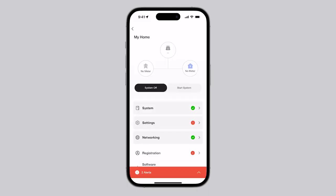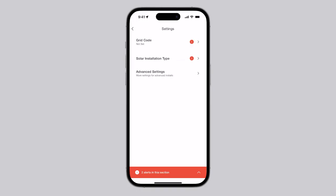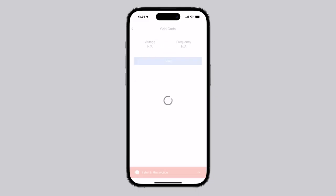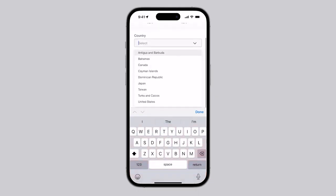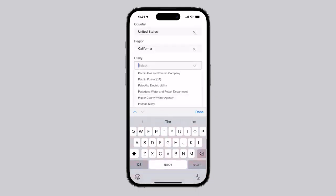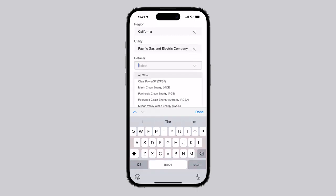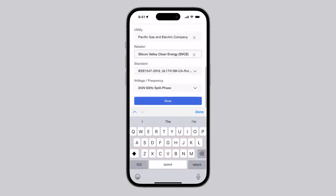Some tiles will have an alert at the beginning of commissioning for every installation, like the Settings tile. The first setting on this page is the grid code, which sets the system's voltage and frequency based on region and utility provider. This setting must be configured before the system can operate.